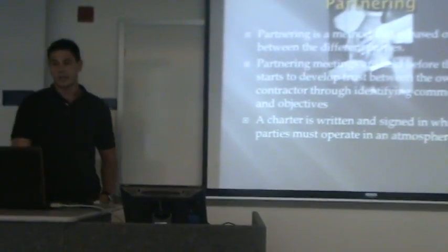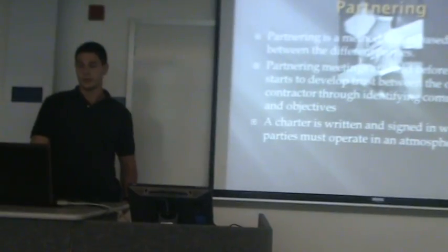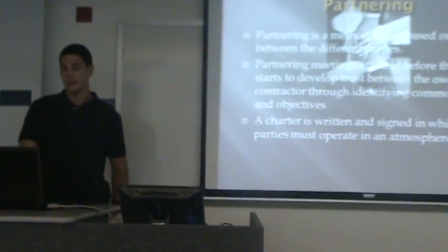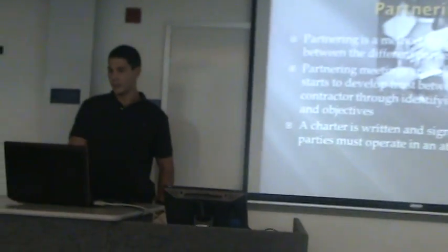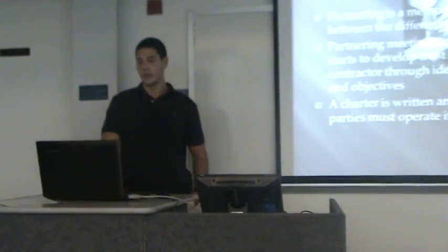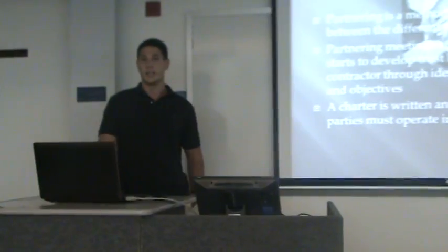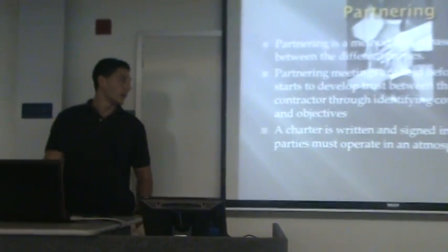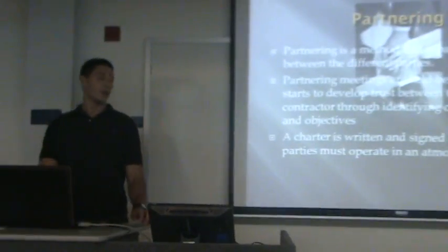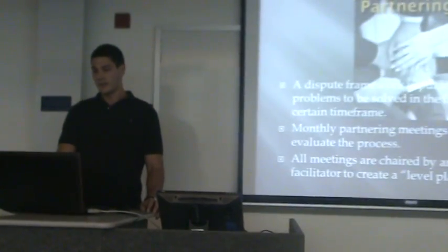Partnering is a method based on trust between the different parties. Partnering meetings are held before the project starts to develop trust between the owner and contractor through identifying common goals and objectives. A charter is written and signed in which the parties must operate in an atmosphere of trust.